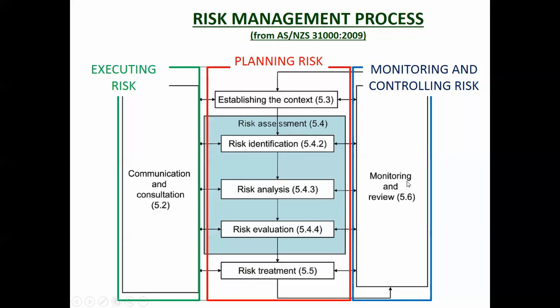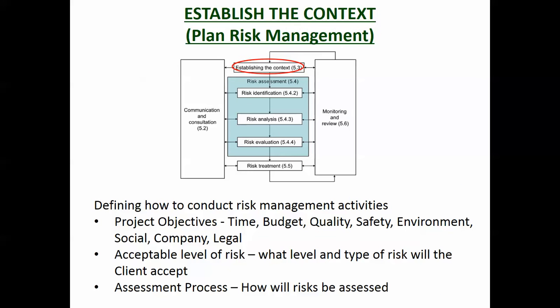Monitoring and controlling risk. And every week you should be looking at the work you're doing and saying, what are the new risks that have come up, and what are we going to do about them? So it's not a matter of just planning it and then doing it. The planning happens all the time. As the project progresses, you're updating that project plan as you go. So let's look at the planning side of them.